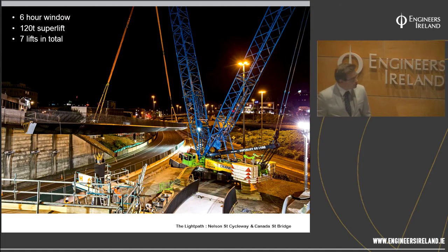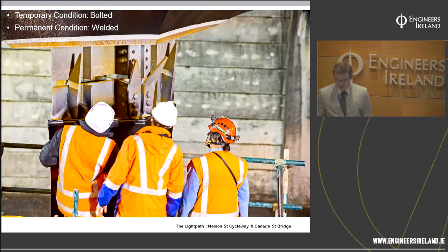And just to make sure, the vertical cables of the super lift, you can't really see it in this photograph, were only within 300 millimetres of the off ramp behind, so there was absolutely no room for error on this lift. So there it is, coming into position.